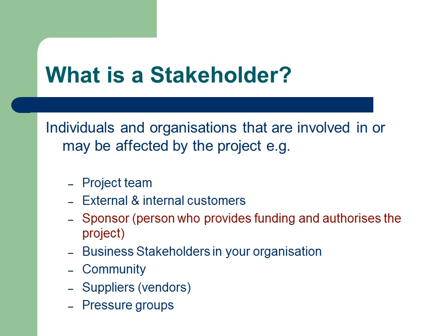Stakeholders may have a positive or negative impact on the project, depending on whether they embrace the change that the project will bring about. All stakeholders must be carefully managed, but it is important to pay special attention to any negative stakeholders. Their concerns need to be understood and an action plan put in place to try to create a positive outcome. A strong negative stakeholder can be the cause of project failure.